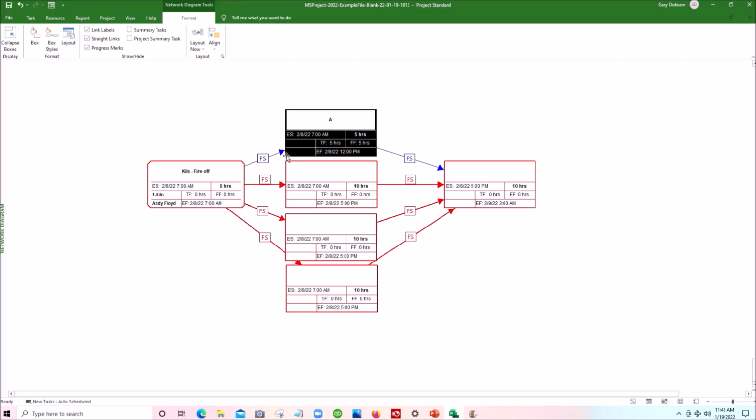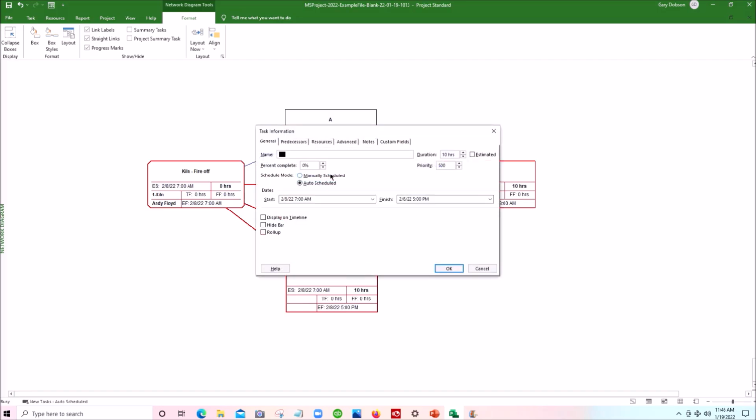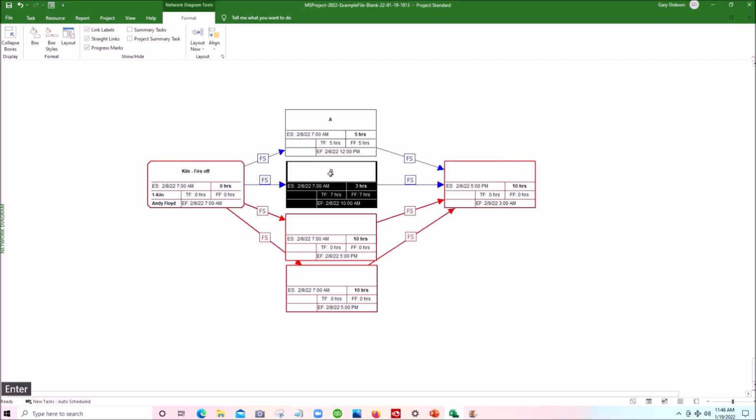and we have everything we need to get our logic up to date with the base timing, so that our computer can produce us with a minimum project duration for the network we build, and we can build our base network very easily. So let's go to the next activity here. A double click with the left mouse, let's call it B, click tab, and that one has, say, 3 hours. So we click 3, enter, and there we have those as well.